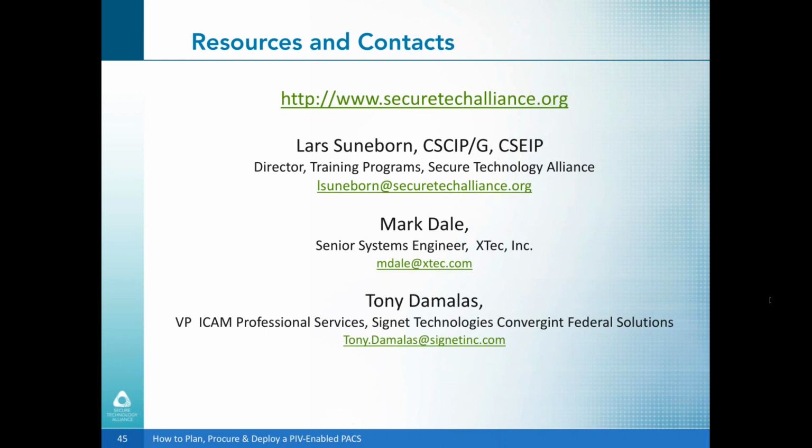So from a government perspective, the answer is no. From a technical perspective, you might see certain communication standards, RS-485, OSDP, various buzzwords like that, that each reader also supports, but the protocols and some of the other things that might be different by design within the manufacturer allow various features that may not be the same, and therefore you can have a risk by having some interoperability issues and some operational problems. So it would be risky to do that from two perspectives, and I would not necessarily recommend it unless that particular reader is also on the list with that manufacturer.